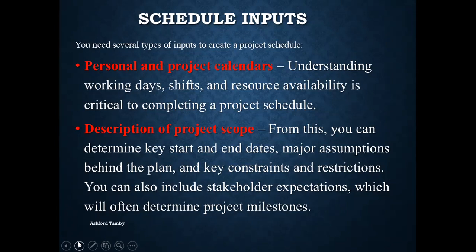And you didn't schedule a holiday, you scheduled work for the 2nd of May, right? And this is just because this week the announcement came out that on the 2nd of May, we would be celebrating Eid. It's not really unforeseen, but the dates for religious celebrations are not always fixed, because sometimes they depend on the moon and different things. So you might have scheduled work for the 2nd of May, which is now a holiday.